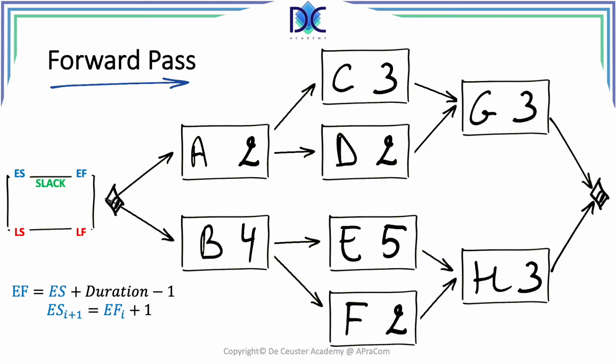This may look strange, but let us consider another example. Imagine you have a holiday of 3 days starting on March the 1st. When will your holiday finish? Well, when you look at the calendar, 3 days starting from March the 1st will end on March the 3rd. And when you consider this as an activity, the start will be March the 1st, plus the duration of 3 days, which gives you March 4th. However, your 3 days end on March the 3rd, not on March the 4th. In order to have the correct end date, we have to calculate March 1st, plus 3, minus 1, equals March the 3rd.